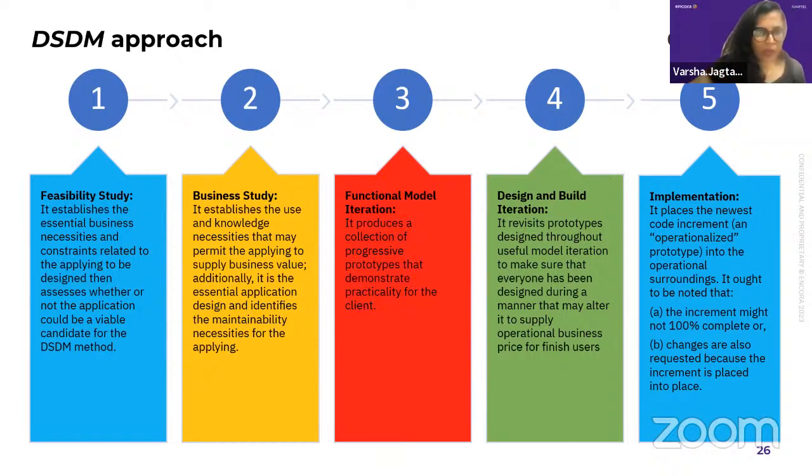This is where our main first step starts. Here we discuss whether this is even viable to implement, and how they can make it work. Why is this being done? What are the risks? I guess the PRL is an output of this feasibility study, so there we will have a list of requirements. And after the feasibility study, we have the business study.